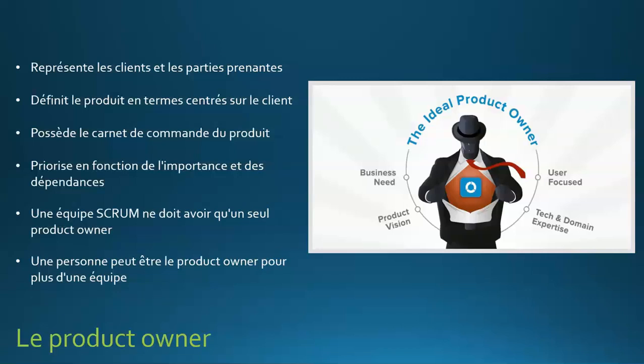The project owner is essentially responsible for the project backlog and in particular for what we will deliver. He defines the priorities according to the need. A Scrum team should ideally have only one project owner. We would not want multiple people trying to define priorities. It wouldn't be possible. So we have to identify him before we even start the project.